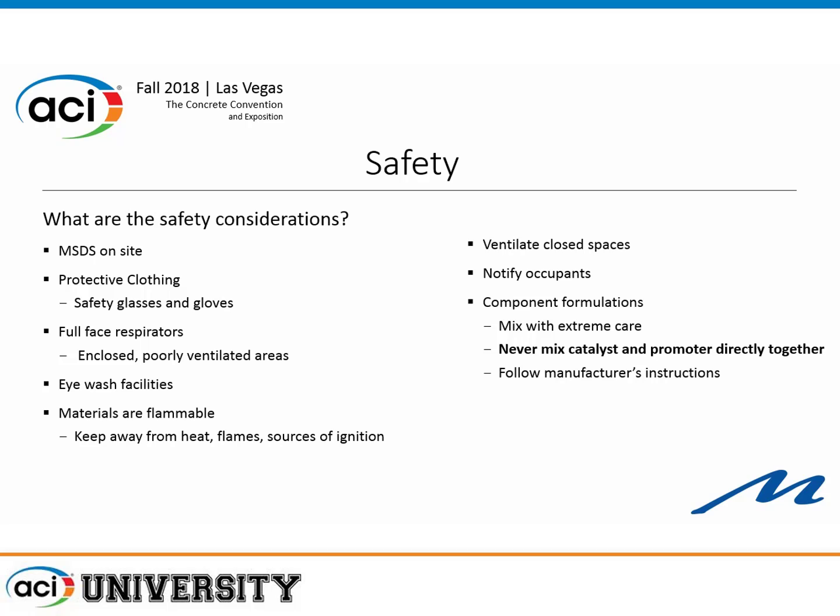You need an MSDS, protective clothing, safety glasses and gloves. Full-face respirators are especially important in any enclosed area because of the odor. Have eyewash facilities available. Notifying occupants is really important — certainly if working indoors. What the contractor should have done on that ramp was simply let the other subs know what time the material would be applied. It cures over a relatively short period, so saying 'keep workers out of this area between 1 and 2 p.m.' would have been sufficient, but that communication didn't happen.